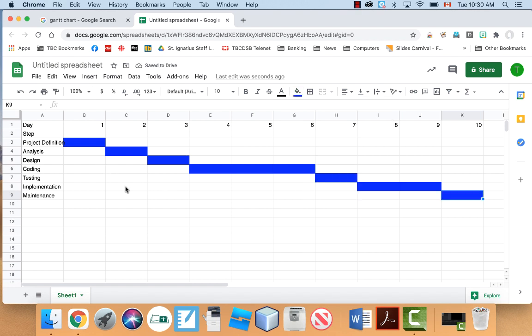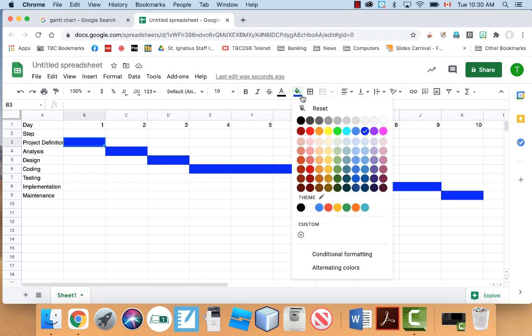And, yeah, that's it right there. So it's a super simple way of making a Gantt chart. You literally just shade in cells, and you can have multiple cells running at the same time. You can do different colors if you want. What I have seen before is that sometimes they'll have it so that if something's completed, they'll be one color.